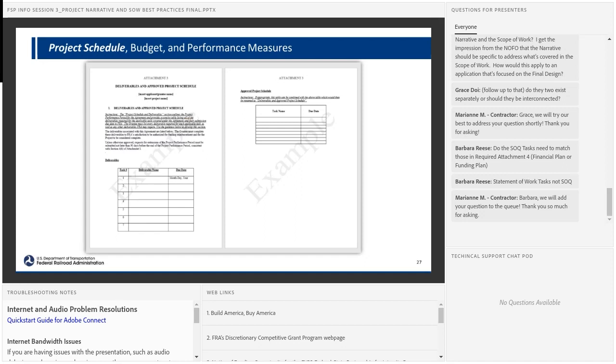If you have a categorical exclusion, maybe 30 days or 60 days is realistic for that. But if you have an EA or environmental impact statement, obviously it's going to take a little bit more time. So these dates are not set in stone. They're malleable. When you submit your application, take your best guess, and if your project gets selected, we can refine them as we move on.